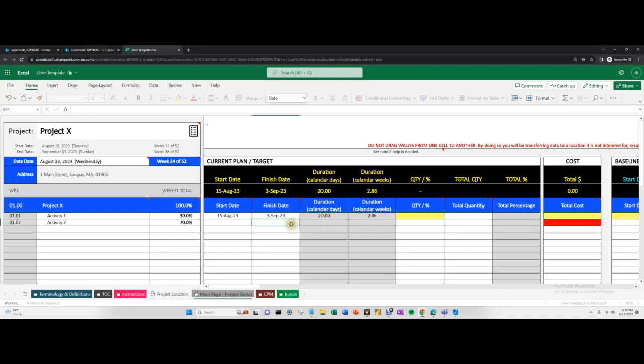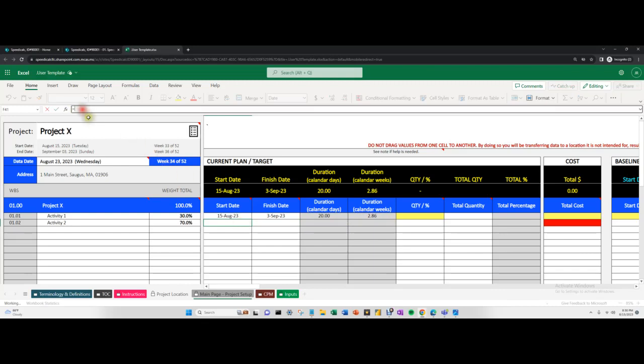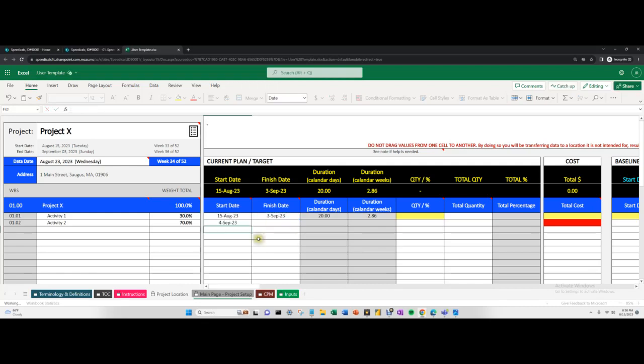This is number of weeks. And again, because it's Excel, what I can do is I can say equals. There's a formula bar up here if you want to type it in here as well. But you can say equals, select the cell, and I can say +1. So it's the day after. And then I'm going to say equals, and then that cell plus, let's just say it's 25 days, plus this date, so 26.